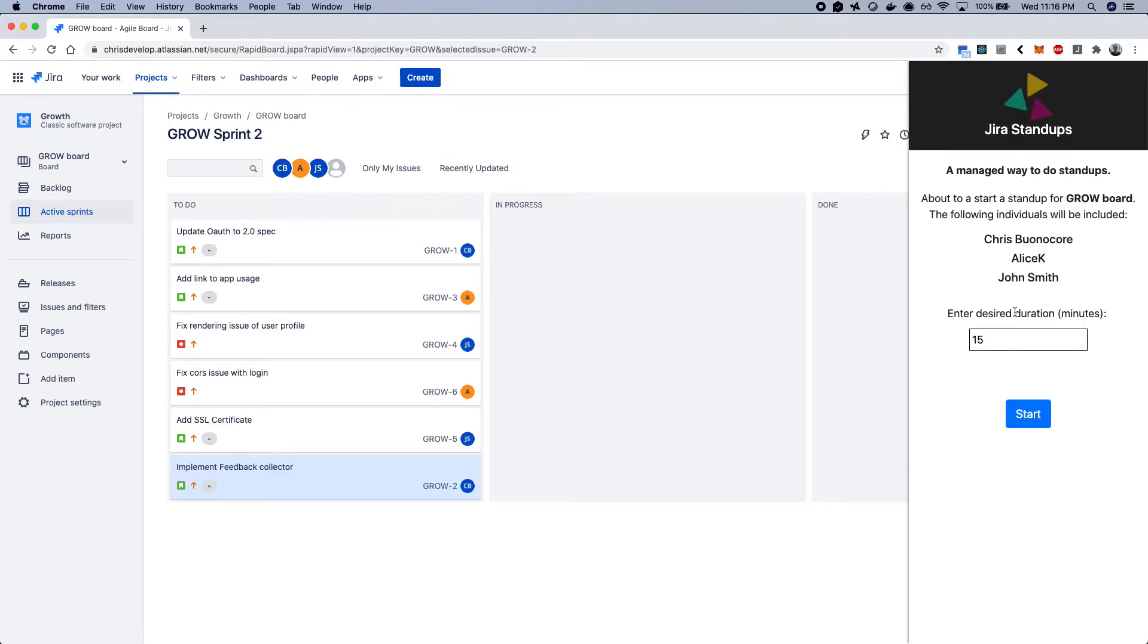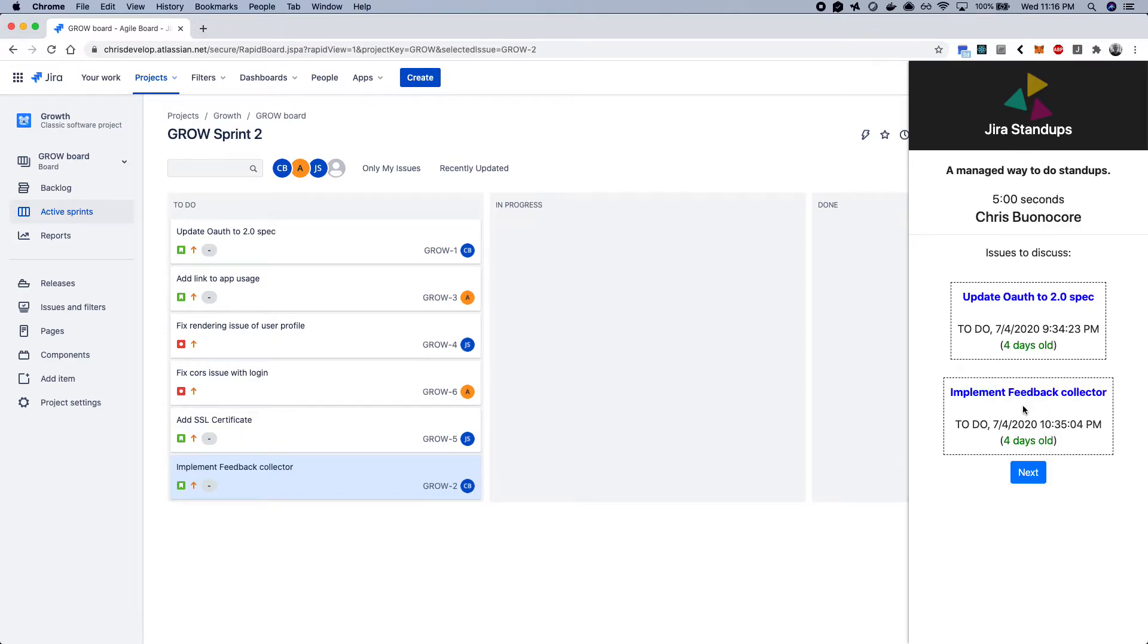So all the processing and rotating around people is actually taken care of for you in this app, as well as the desired duration. So if you have a 15-minute stand-up, 30-minute, it'll automatically figure out how long each person should be talking. So I can go ahead and start that.